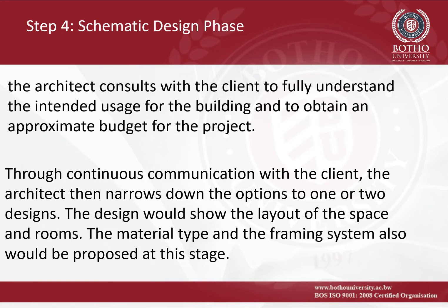The step 4 of the process is the schematic design phase. In this step, the architect consults with the client to fully understand the intended usage for the building and to obtain an approximate budget for the project. Through continuous communication with the client, the architect then narrows down the options to 1 or 2 designs.